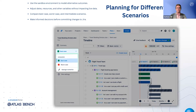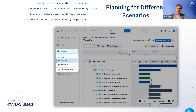One of the powerful features of Plans is the ability to create multiple scenarios. Think of scenarios as different possible futures. Because your plan acts as a sandbox, you can freely experiment by changing dates, adjusting team capacity, or altering dependencies — all without affecting the live JIRA data your teams rely on every day. For instance, if you want to see what happens if a key resource becomes unavailable or if a particular deliverable gets delayed, you can build out a worst-case scenario. On the flip side, you can create a best-case scenario if things go incredibly smoothly. By comparing these different views, you gain insight into the range of outcomes, helping you make more informed decisions and proactively manage risks before you commit changes back to JIRA.